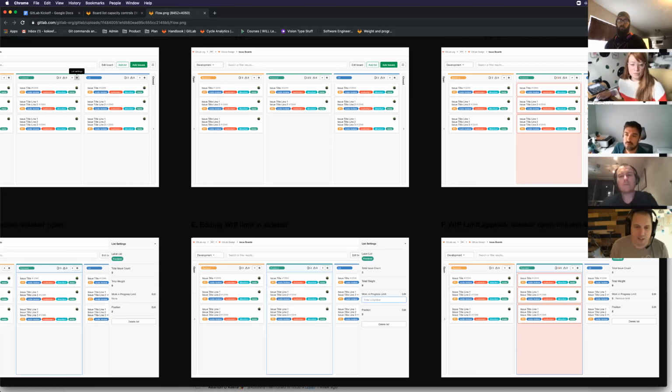So you might always want to have 2 or 3 things in progress, and if not, it's a good indicator that your upstream could pull downstream a little bit more. I've never used it before. I've only always used max, but different teams I suppose use min.